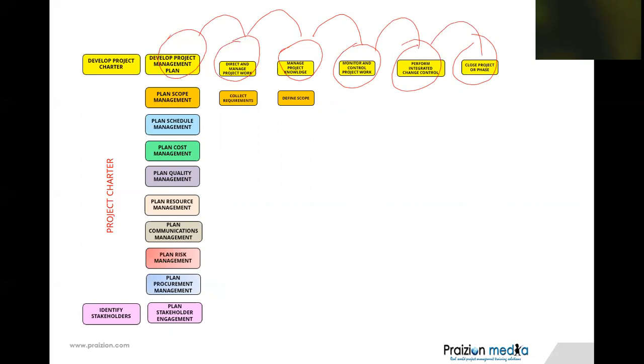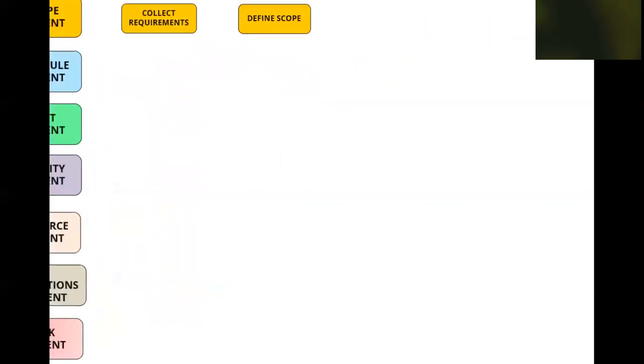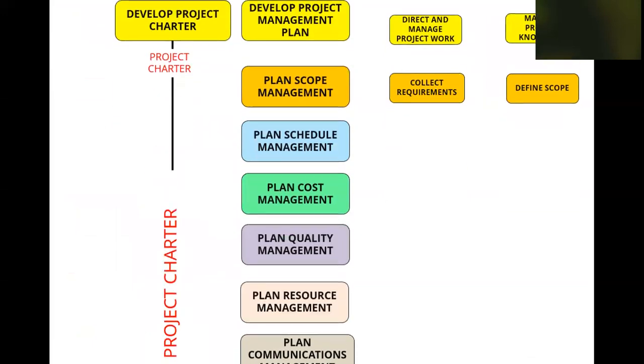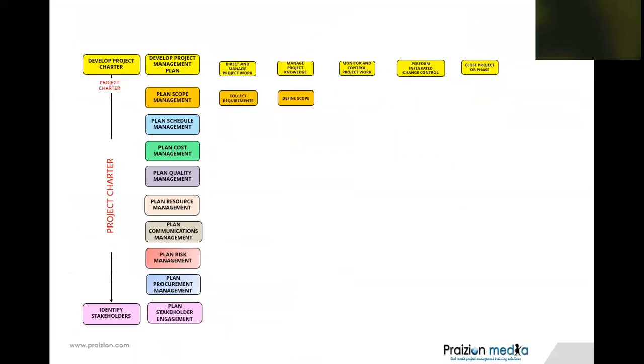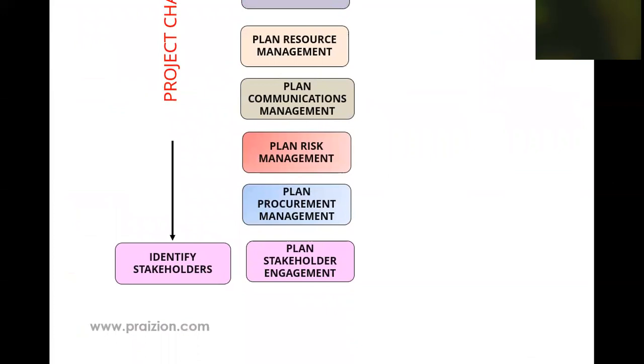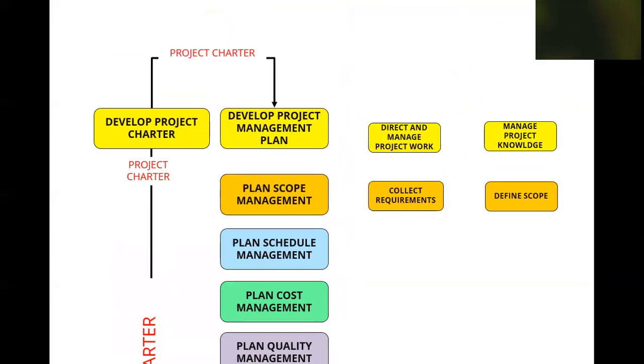So, let's take a look at the very first process at the center of our discussion, right here. You can see that arrow going from Develop Project Charter giving you the Project Charter as an output. The Project Charter goes out from Develop Project Charter, and it goes to a number of places. You can see the Project Charter again at the top here, and look at where it's going. It is going to two places. We can see it going to Identify Stakeholders. That's a very important relationship to call out right away. And then we can also see it going to the Develop Project Management Plan process.